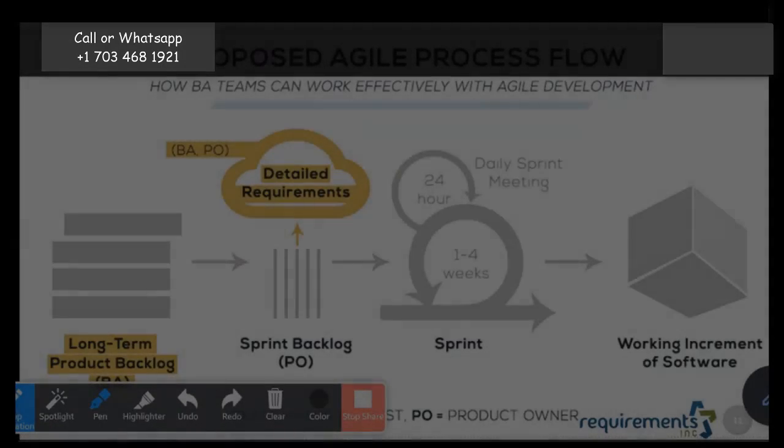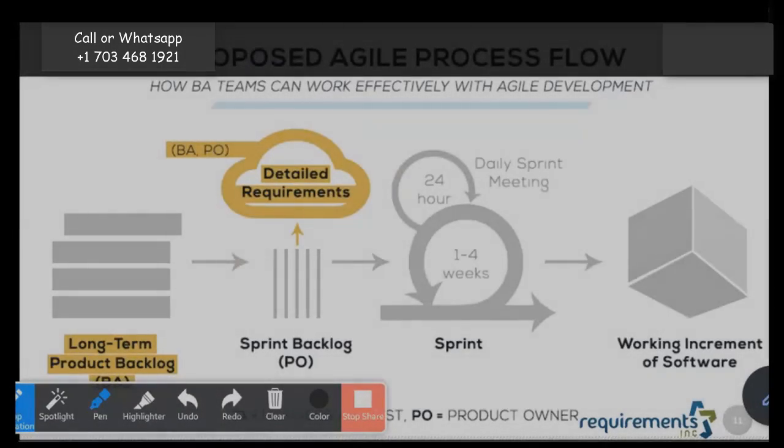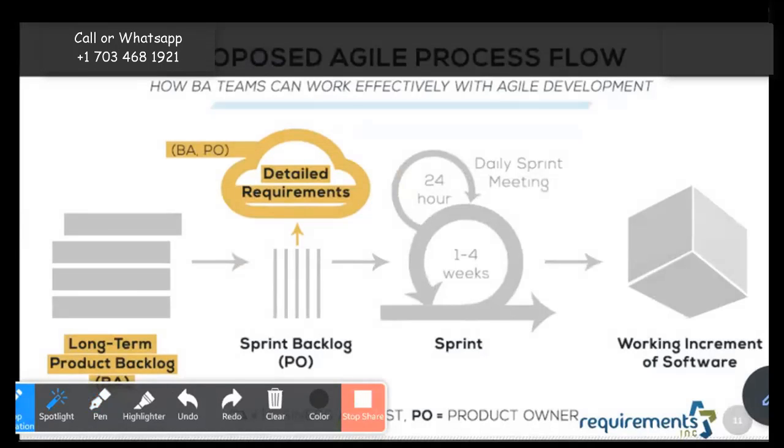So once you've decided what your sprint length is, right? Your sprint length is 1 to 4 weeks. We know that, we've defined that. Once you know that, okay, within that 2-week period, how many items can I take from this backlog? Okay, this sprint, I'm confident I'll be able to take 4 items. Let me take those 4 items and then figure out what needs to be done to get those 4 items ready to ship to the customer in this little box.